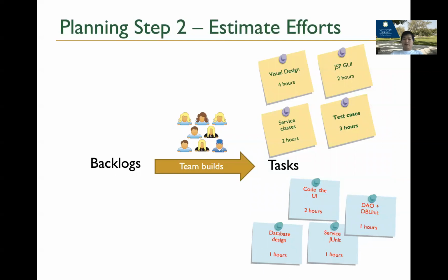So there's some very simple math here, but the really challenging part is how do we estimate the hours? Because the working hours are fixed, right? Everybody has 8 hours per day. That's easy. And you have a certain number of developers. That's also easy. But the really challenging thing is how you put the number of hours on each single task, right? That will involve some kind of discussion. All right. You really don't want to give the wrong hours. If a task is really challenging and you only put 2 hours, then that's going to mess up the whole plan.